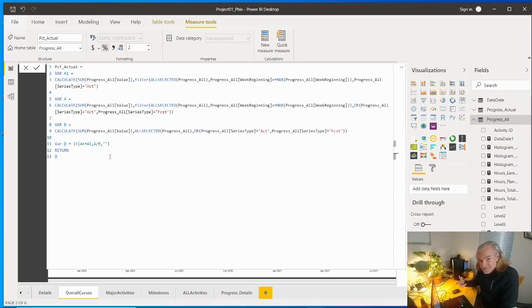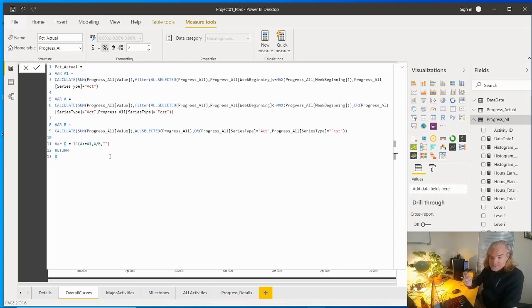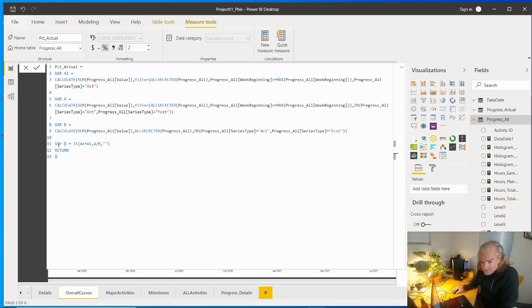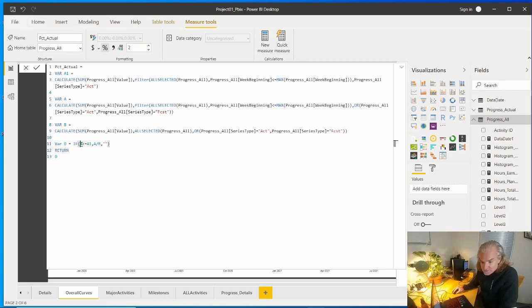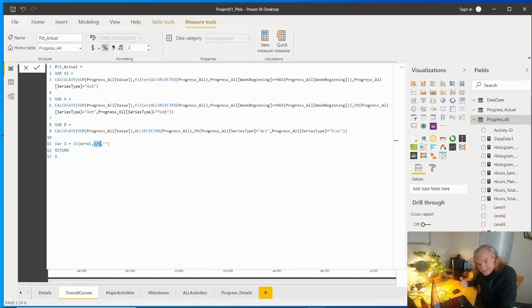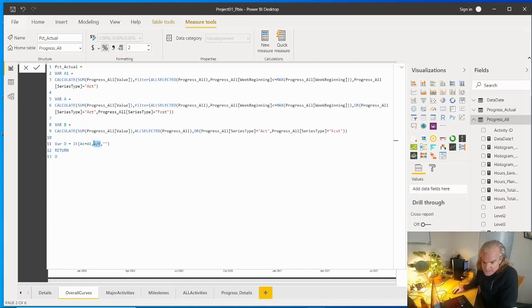You want to make a specification where we want some numbers up to the data date, and then above the data date we want nulls. You do the same thing in Excel graphs because you don't want the actual curve to drop down to zero and see the line continue. You just want it to stop at the current date. We've got a little condition in here to build that condition. We're saying that as long as A is less than or equal to A1, then calculate our percent, which is just total to date divided by total.